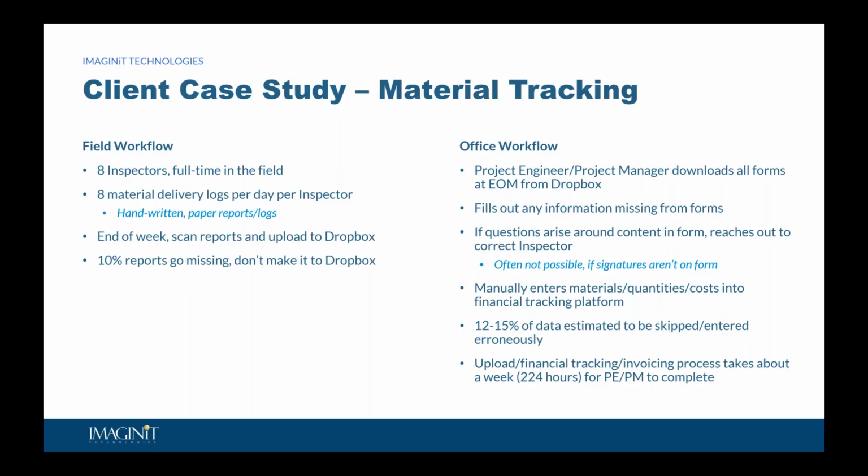So I worked with a client, and this organization, this general contractor, had 8 full-time inspectors in the field. Each of those inspectors was responsible for completing about 8 material delivery logs per day, okay? And these logs were all handwritten on paper. At the end of the week, the inspectors would go to the job trailer and scan these reports. Maybe they're taking photos of them with their phones, or maybe they are actually using a scanner and uploading them.